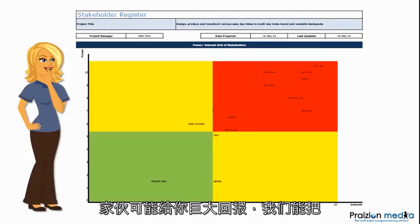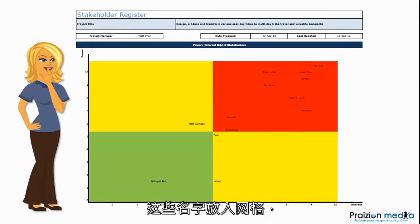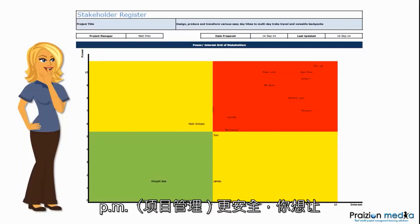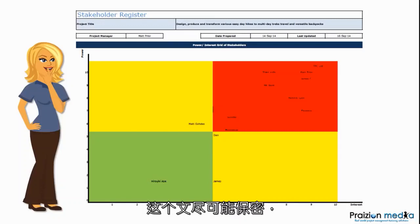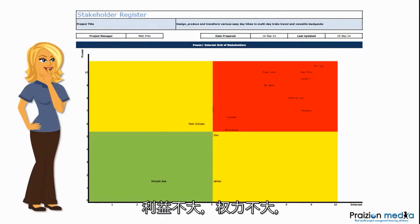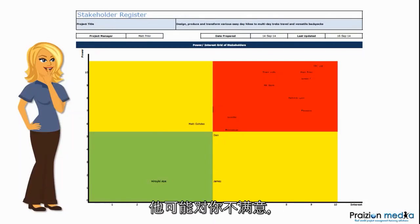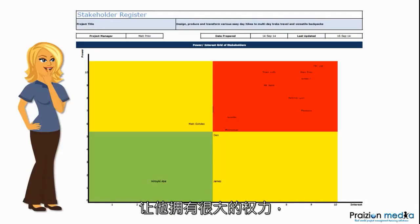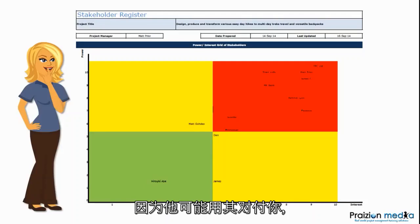Because those guys could give you a huge payoff. We can take these names and put them on a grid, or we can use their initials, which is probably safer as a PM. You want to keep this document as close to the vest as possible. Don't show James that he has a low level of interest or a low level of power — he may not be very happy with you.